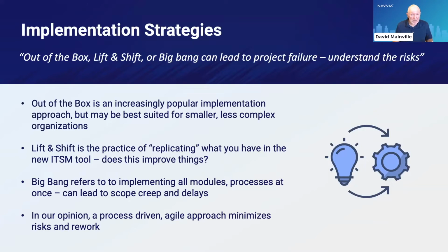So in our opinion, a process-driven agile approach where you focus on one or two processes, you get those done right, you get them implemented, you get them rolled out, you get people trained before bringing in others, is a good way to achieve success.